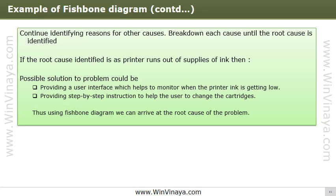Depending on the complexity and importance of the problem, you can now investigate the most likely causes further — this may involve setting up investigations, carrying out surveys, and so on. In this example, if the root cause identified is that the printer runs out of ink supplies, then possible solutions could be providing a user interface to monitor when ink is getting low, or providing step-by-step instructions to help users change cartridges.